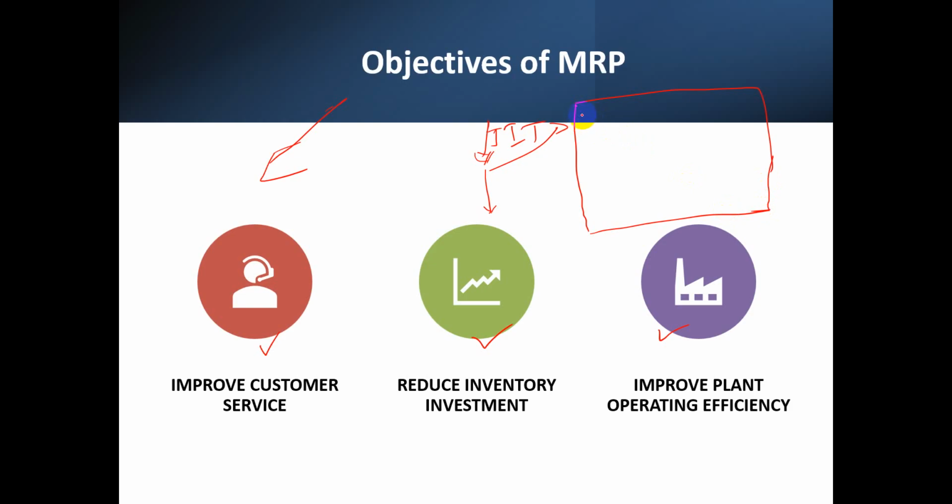Some of the parts we require at the early initial stage, like January, March, maybe October, maybe December. This is the timeline of the project execution stage. If you want to manufacture, we require a 1 year schedule, or what we call lead time. Some of the material we require only at the end of the stage, like maybe in December.